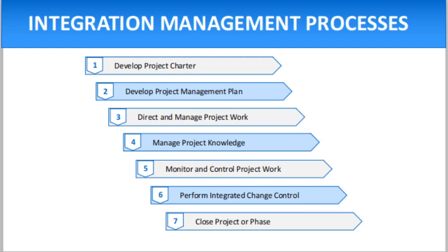An example of a project change is if the client asks for additional assets, in which case you need to evaluate the level of impact on the project. Use a change control log to document all change requests, including which ones are approved, the associated costs and resources, and how they impact the project timelines.